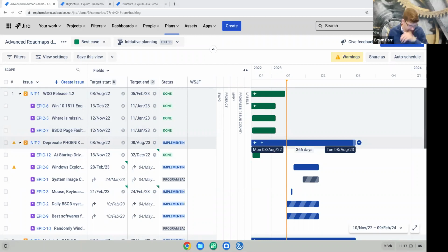So I guess what I'm saying is, every team has a different meaning of story points, and of course, when you apply story points to a roadmap, you are by nature converting it into time. And so if you know roughly what a story point is, and don't tell Agile teams this, I know this is a dirty secret about scaling, you can convert that into time and see it appropriately on a roadmap.